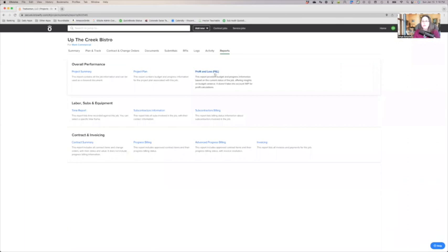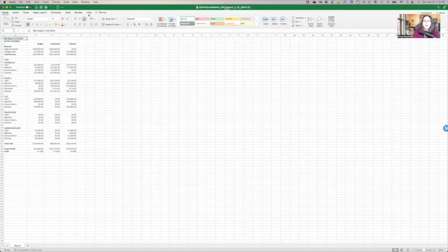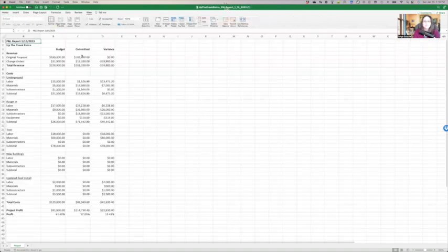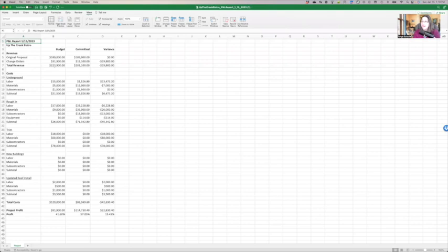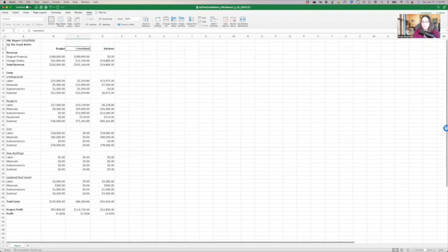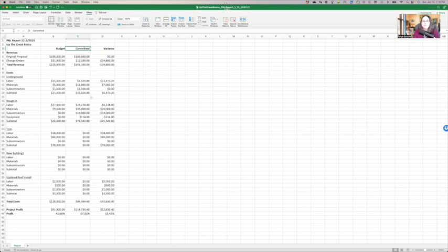If you were watching in our profit and loss session in this series, you may have seen that I pulled down this profit and loss report, and I'm going to pull it one more time. Let me go ahead and make this a little bit bigger. Also on this P&L report, we can see our budget versus committed and then see a variance. So this is also very good information for us to see budgets versus actuals, or in this case, committed, meaning including our open POs, remember, and the variance.